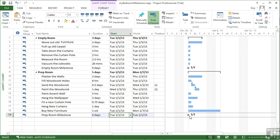I will then have on my Gantt chart a physical representation of the date of that section finishing — the planned finishing date. Everything is just a plan until we start doing it. So that's the easy way to add milestones in: simply give them a duration of zero and you will see a milestone marker in the Gantt chart with, by default, the month and the day.